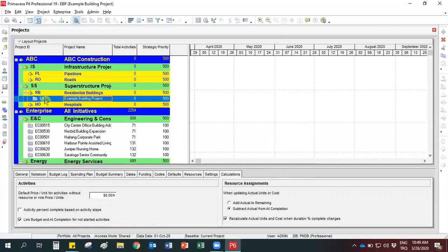Okay, when you look at the class exercise 5, we selected the EPS name, we selected the project start date, and we assigned a responsible manager. But we didn't select the project calendar yet. Because the wizard didn't ask the calendar of the project. The reason is that P6 directly assumes default calendar as the project calendar. Now I will show you how to change the calendar of this project.